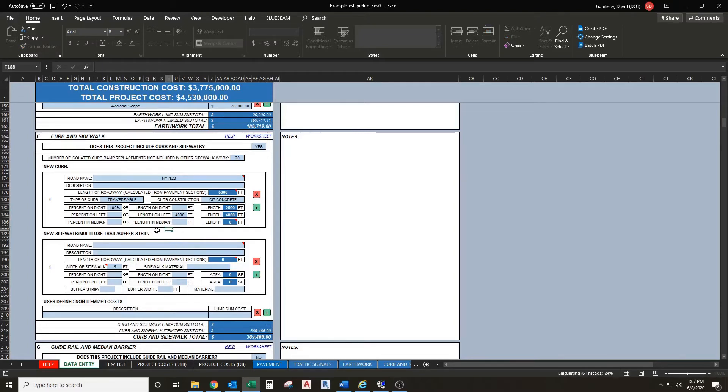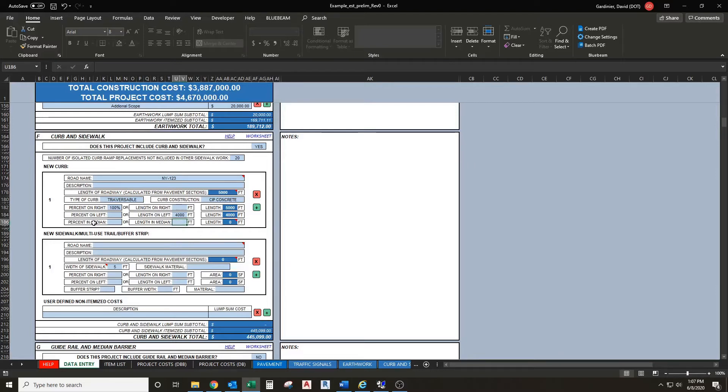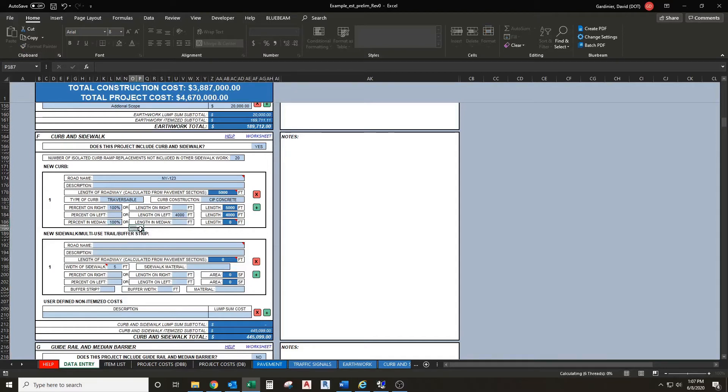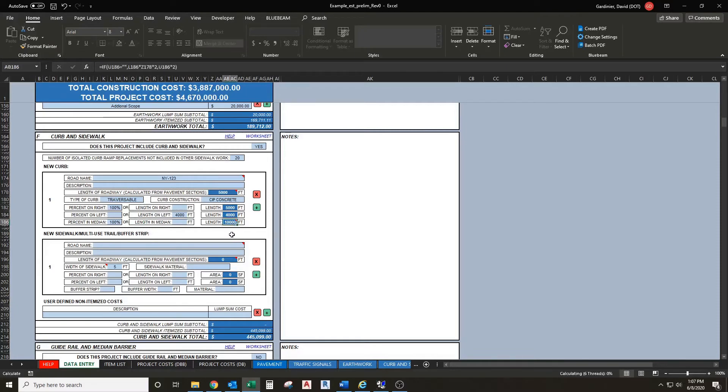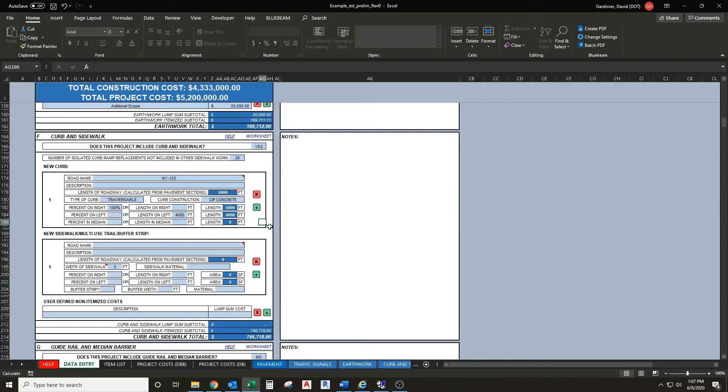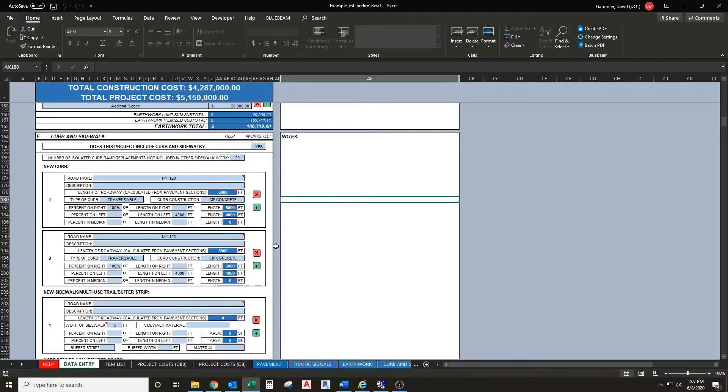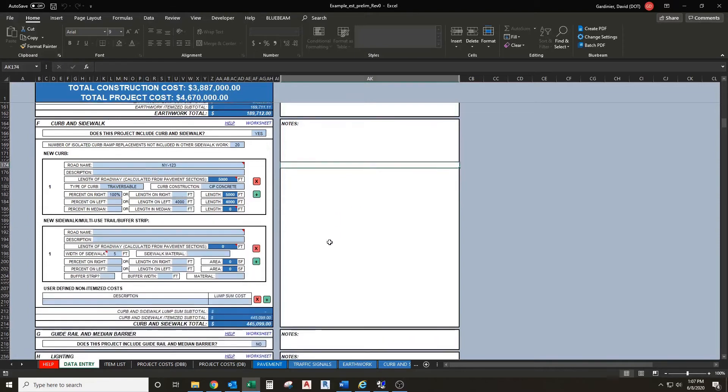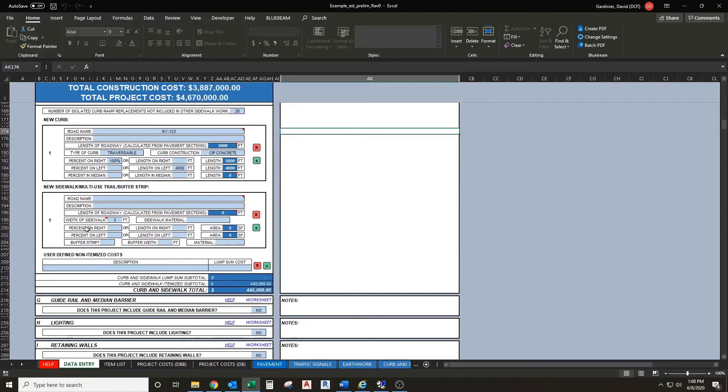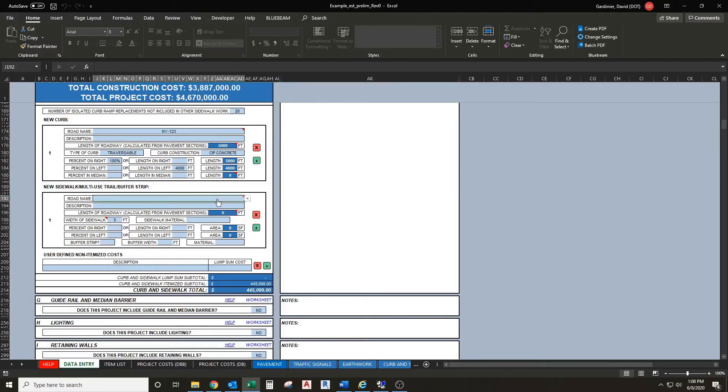The next line here is percent or length in median. If you have a divided highway that's going to be curbed you can enter that here as well. When we put in 100 percent it'll multiply your length by two, assuming your median has curb on both sides. If you want to add another curb segment we can hit the plus which will add another curb segment. If you don't want it, click the X to delete it. The add and delete works the same way for the sidewalk.